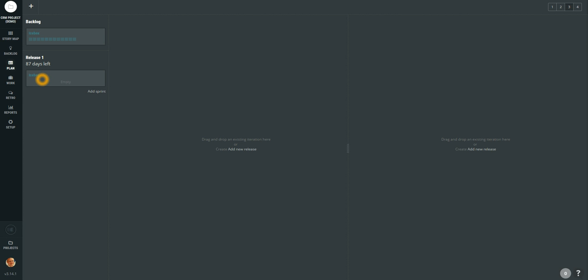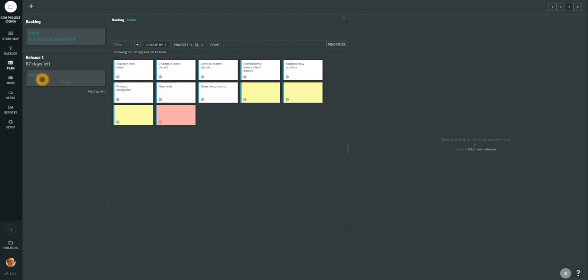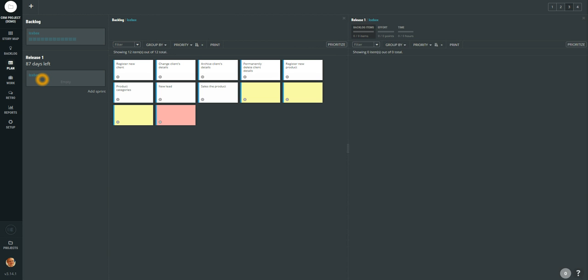So let's say that we have our backlog and we have a release. I would like to plan some user stories from the backlog to particular release. To do so what I need to do is just drag the icebox from the backlog. Now you see in the panel the content of the product backlog. And now I am going to drag Release 1 icebox to the second panel.